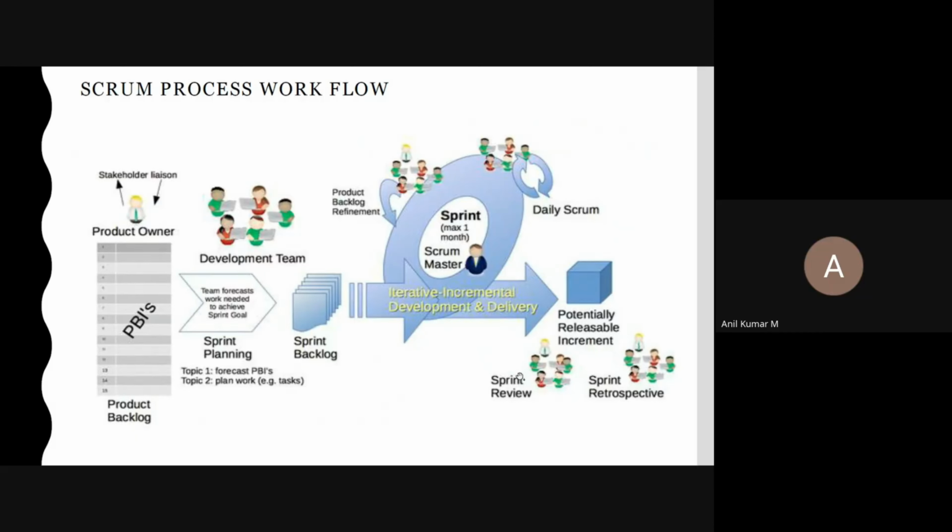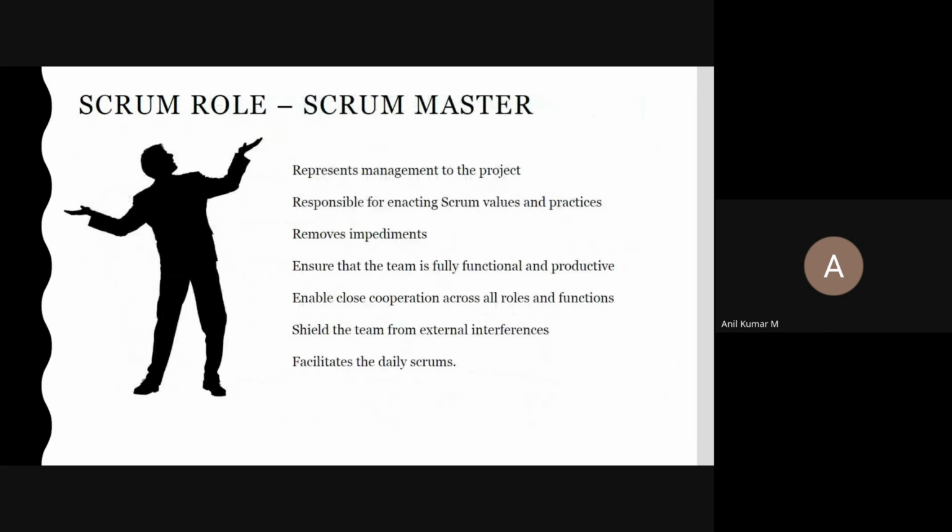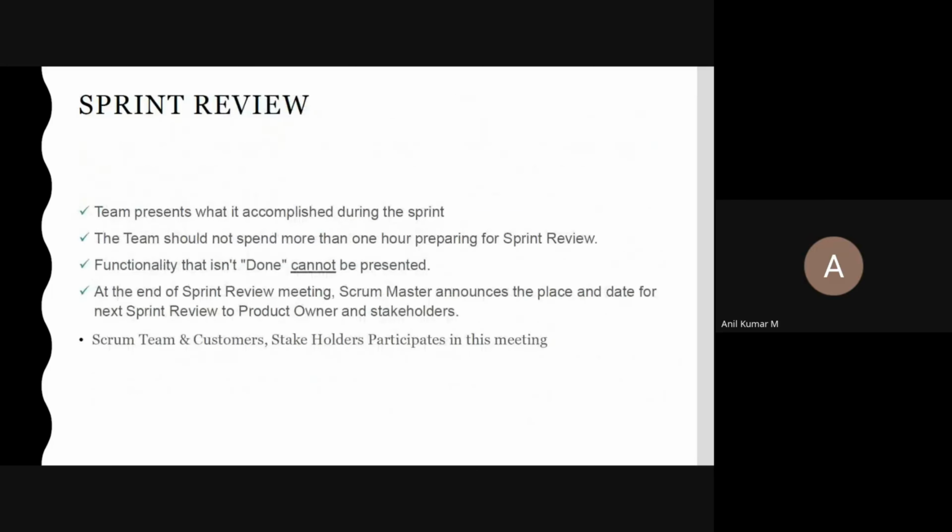And we have this sprint review meeting. We have developed all the 5 user stories, and we tested everything. Now the third scrum ceremony is the sprint review meeting. What is the sprint review meeting? The sprint review meeting is nothing but, after completion of all the user stories, the scrum team gives the demo to the client, the product owner, and his management people.